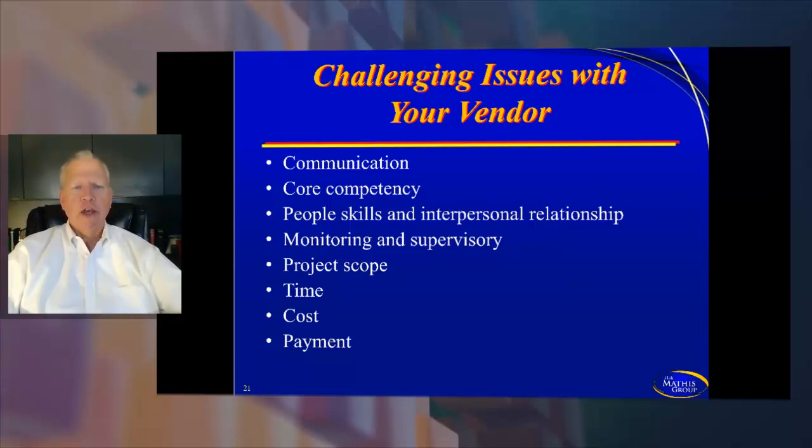Core competencies. These are the core competencies or the people skills that we need, or the type of skills we need for this project. Many times you'll see a vendor go low-cost provider. They've sent resumes in on all their highest qualified people to get the contract, but then they send second-tier people in. These are good people, no mistake what I'm saying. They're good people, but they don't have the skills that the first-tier people did.